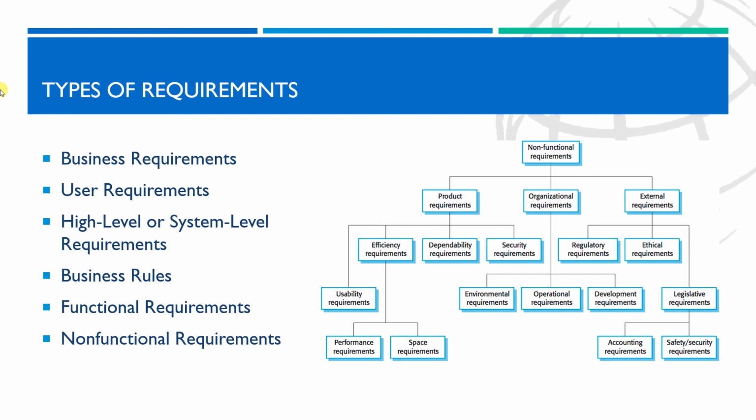It is recommended that a workable number of system-level requirements be identified for a large system, more or less 250 to 2000 requirements. It's important to identify them in case we are developing a big system.